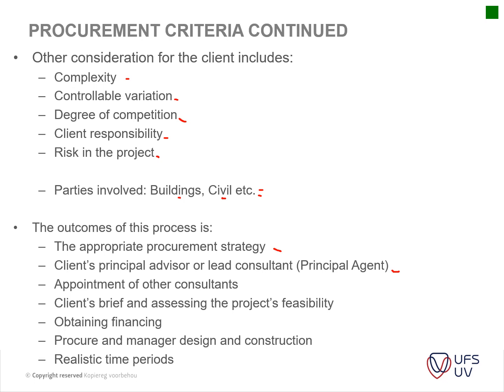Then the appointment of other consultants is also dictated by all of these parameters above: your client's brief and assessing of the project feasibility. Is this project feasible or not? Does he have extra cash for it? Is it a very high risk project for him? Is he dependent on the income as quickly as possible, etc.? Obtaining financing: if he has to go to the bank to get financing, will the bank accept the proposals, etc.?